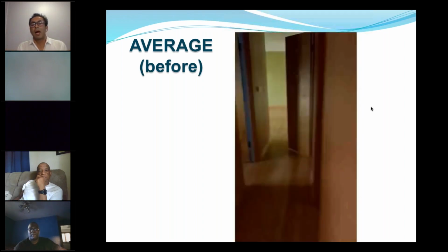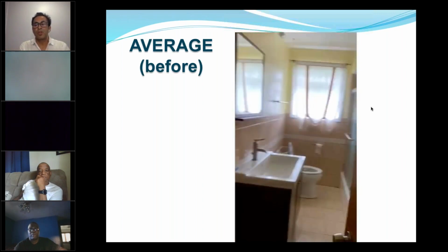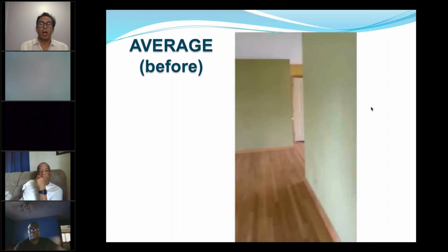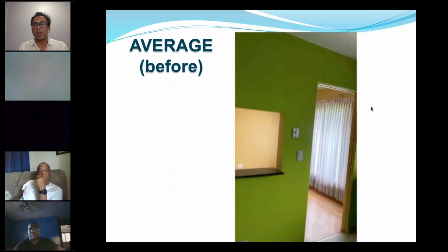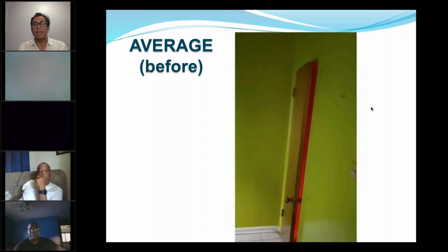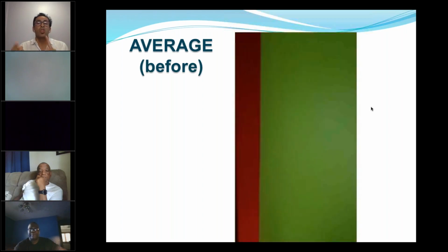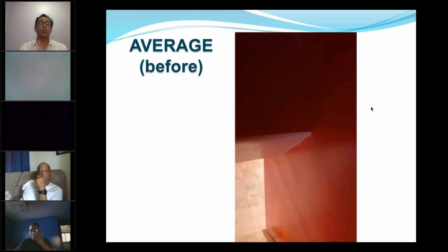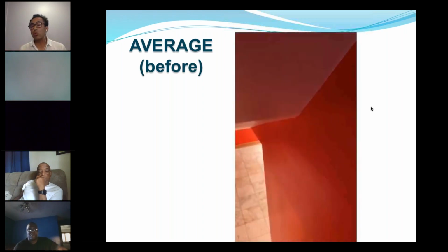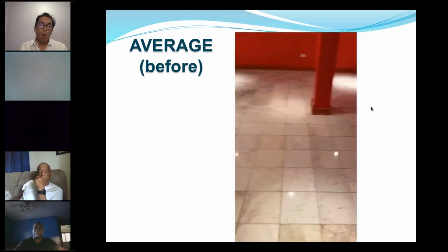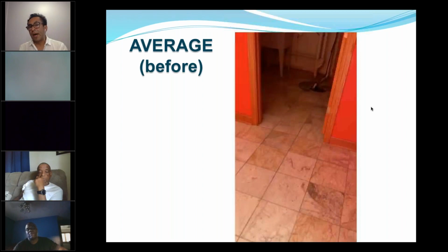Okay. But look at the bathroom. You see the tile? That bathroom needs to be updated. Now you're going to look at the kitchen. You see the kitchen? It looks dated from the appliances, the kitchen cabinets. Okay. So 2 things. I know right away, in seconds, we need to do the bathroom and the kitchen. That is why the rehab on this is going to be over 25,000, okay?